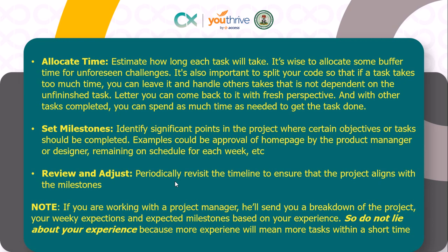So you see, those are some of the issues that you can have. So it is important to split your code, so that if a task takes too much time, and this is sound advice, you can leave it and handle other tasks that are not dependent on the unfinished tasks.